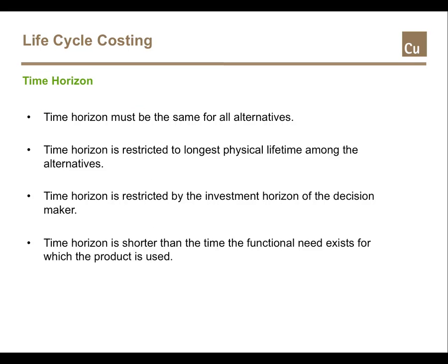LCC analysis is all about decisions that are optimal from a long-term rather than a short-term perspective, so it's important to define just how long your time horizon is. The following 4 guidelines will help you to define your time horizon. Whatever time horizon you choose, you'll need to use the same for each alternative. The time horizon is restricted by the longest physical lifetime amongst the alternatives. The time horizon is restricted by the investment horizon of the decision maker.